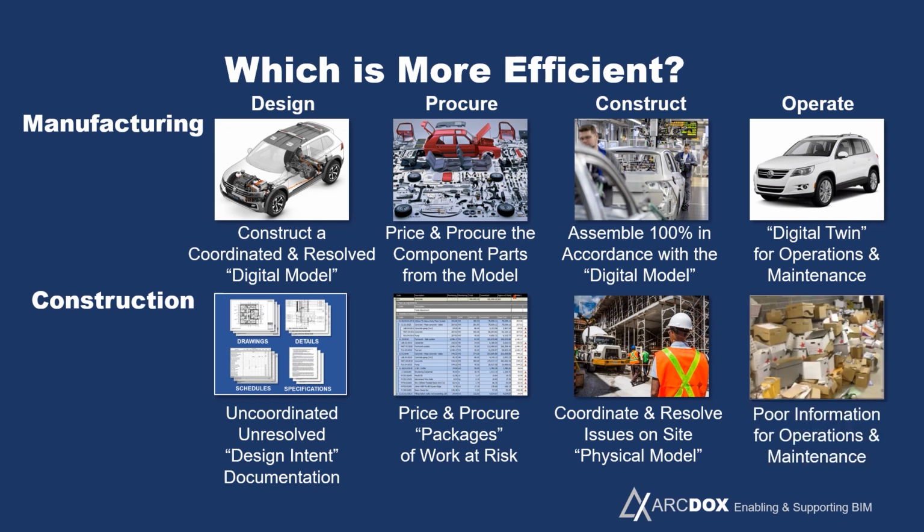But also from an information management point of view, since so much is happening on site and is probably not being captured as to what was actually built, the information that we have at the end is really just a mixture of design intent information, or maybe design intent information overlaid with some red line markups to say what has or hasn't changed, and some fabrication information. So it's a whole mix of information that doesn't really describe or capture what was actually built on site.